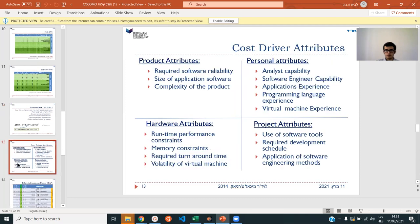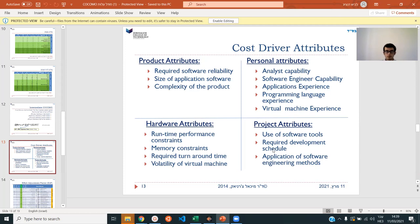These are some cost driver attributes — things that may drive the cost and make it take longer or shorter. For example: software engineer capability — how good is your programmer? How much application experience does he have? How much has he used this language? Has he used virtual machine experience? Then there's project attributes: will we be using software tools or doing everything by hand? Application of software engineering methods — will we follow certain programming principles or just have everyone do what they want?